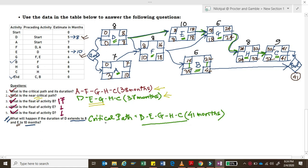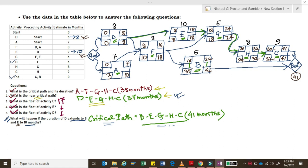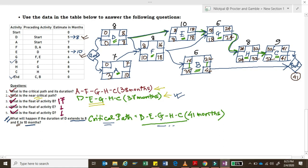Notice what has just happened: the path D, E, G, H, C was the near critical path in question 2, but now — because activities D and E had their durations increased — that subcritical path has become the new critical path. This illustrates why a project manager must keep a close watch on both the critical path and the near critical path, because you never know when activities on the subcritical path get delayed and it becomes the new critical path.